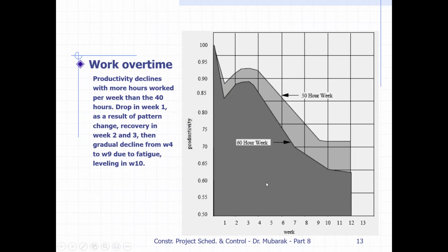Here they just want to say that we should be careful when taking work from our labor force. They should not work more than 50 hours. It's too much. Even some people work 12 hours per day, which is too much for them. The standard is that we should work around 40 hours per week, or 8 hours per day.